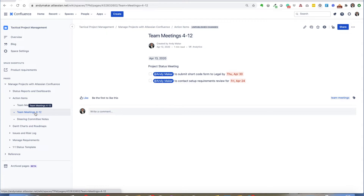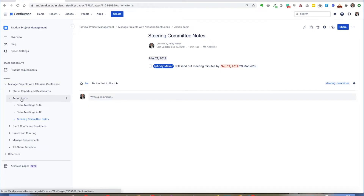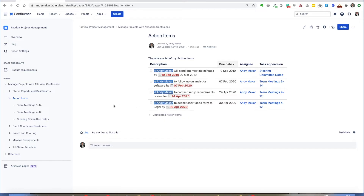The following week there were another number of action items that were incurred, also documented in a checklist. You can also have steering committee meeting notes, so it doesn't have to be just a team meeting format — it could be any type of page. If you have a checklist and you're able to assign a resource as well as assign a date, the macros will pull this together into one action item list. I've used this technique on large projects and programs where you've got a ton of people all working in different meetings and different work streams, yet all trying to come together with a common action item list. By using this approach, you're able to get one large action item list that everybody can review and quickly get status at a glance.